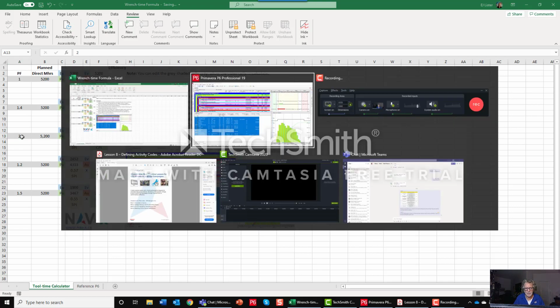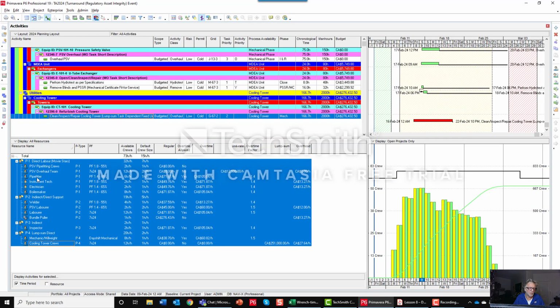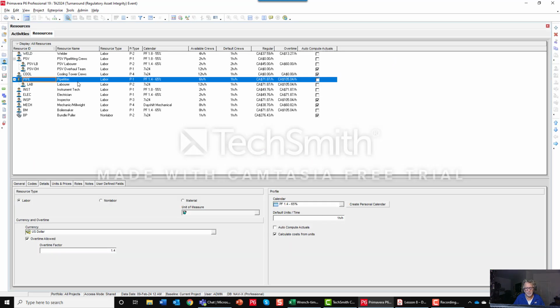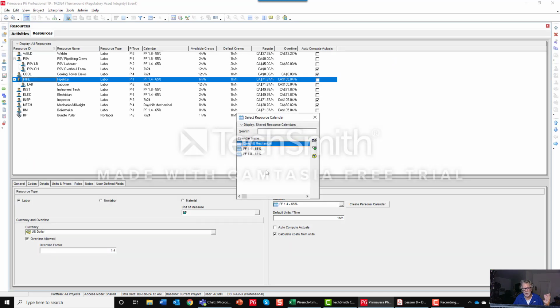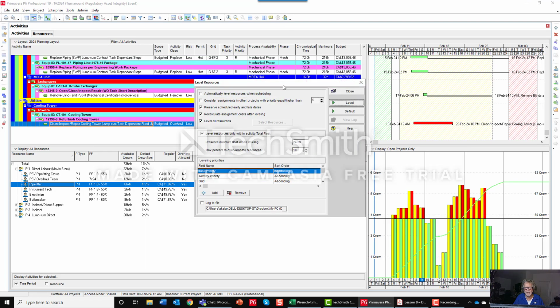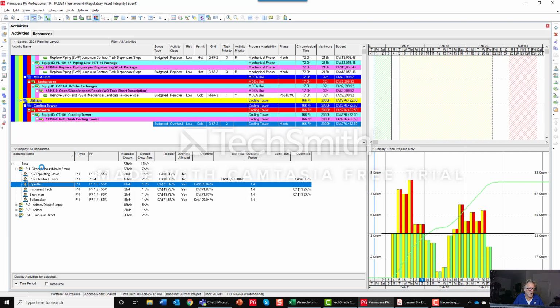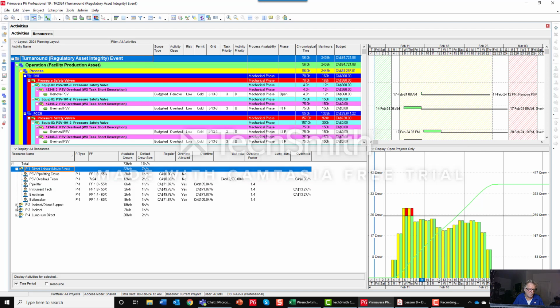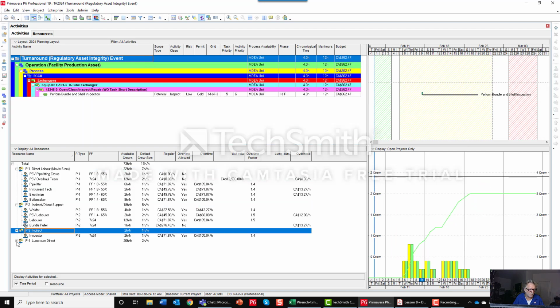And how do I do that in P6? I'm going to go to these resources, for example, these pipe fitters. I'm going to apply a productivity factor of 1.8, and then I'm simply going back using the dynamic feature for leveling, scheduling, and I'm going to produce a new plan based on what I had put in for a productivity factor.